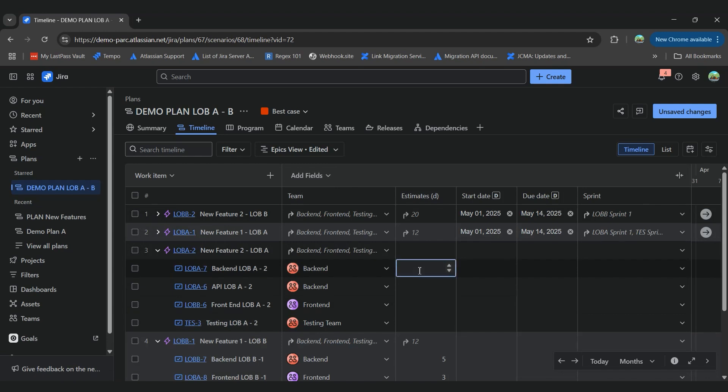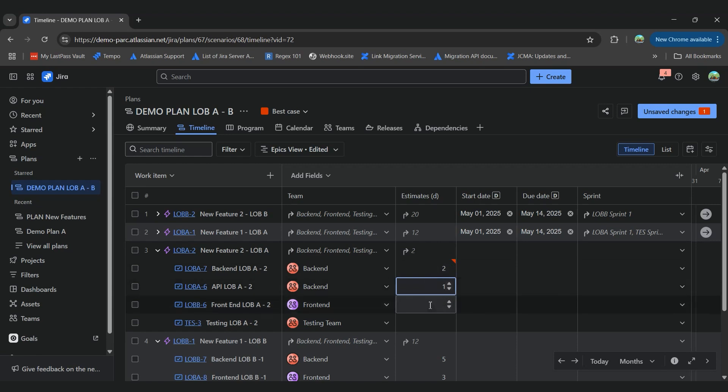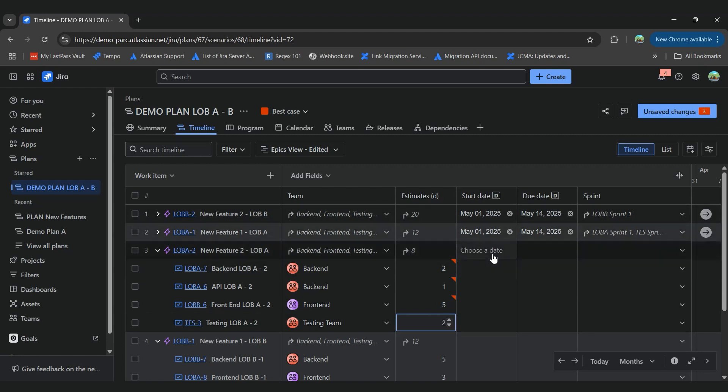So for example, let's put only two days for development of the backend, one day for API, another five days for the frontend, and two days for testing.